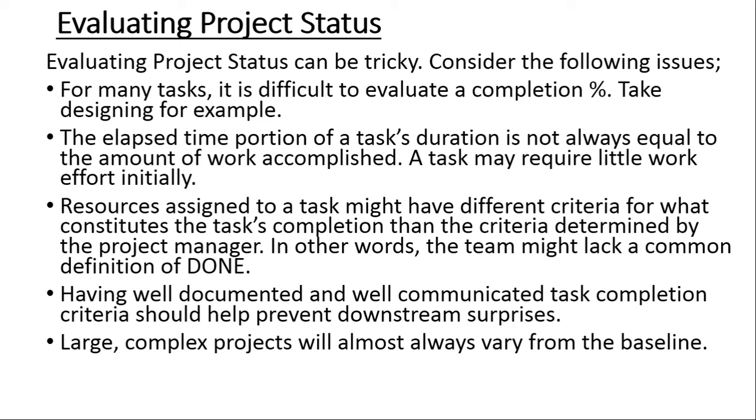Also, the resources that are assigned to a task can actually have different criteria of what constitutes completion, which is different from what the manager defines as a completion percentage. So if you ask, for example, the bricklayer, can you tell me roughly what is the percent completion on the wall? To him, he might just look at the height of the wall and say, okay, if the wall is 2 meters and I'm at 1 meter, then I'm at 50%.